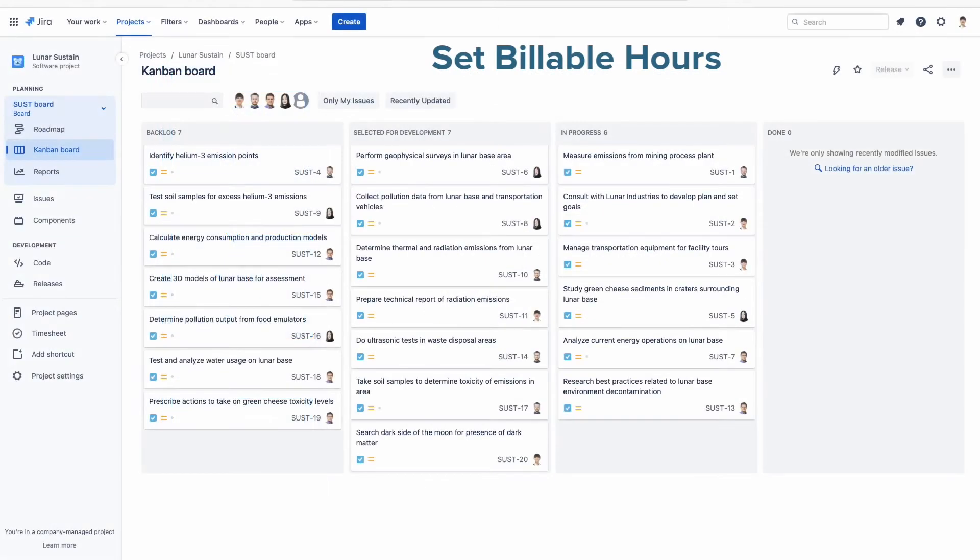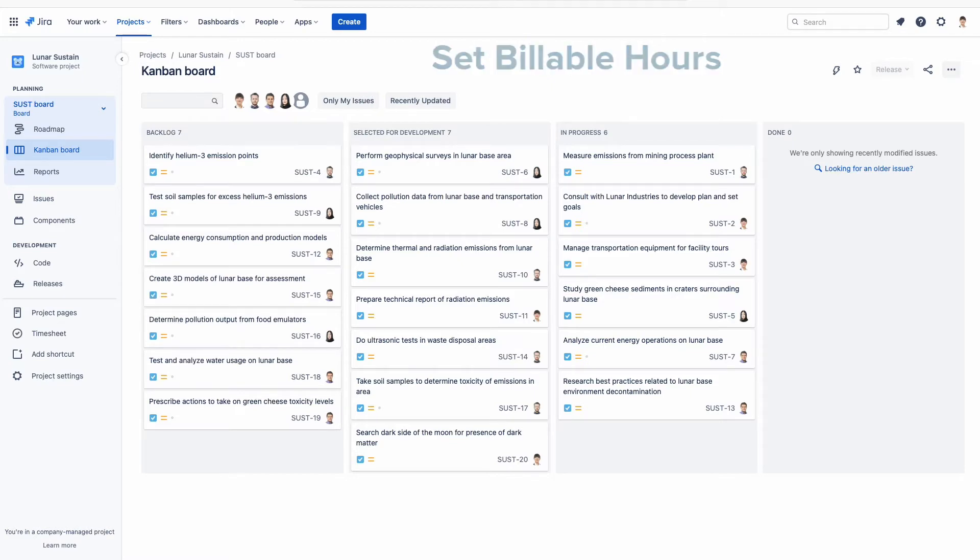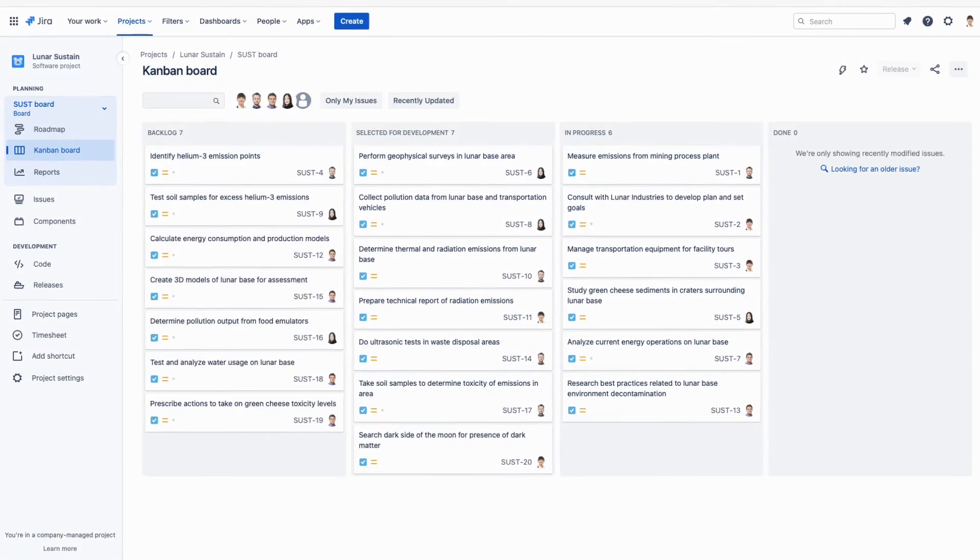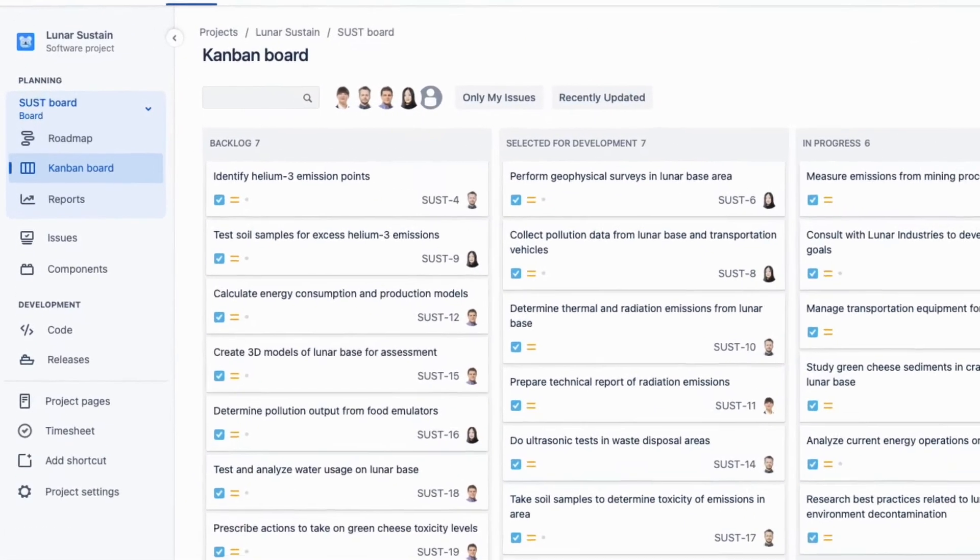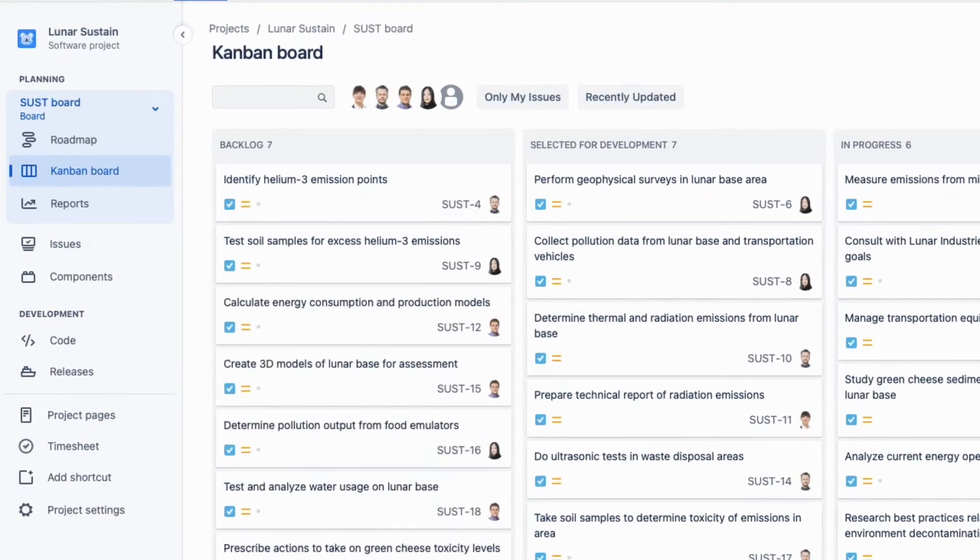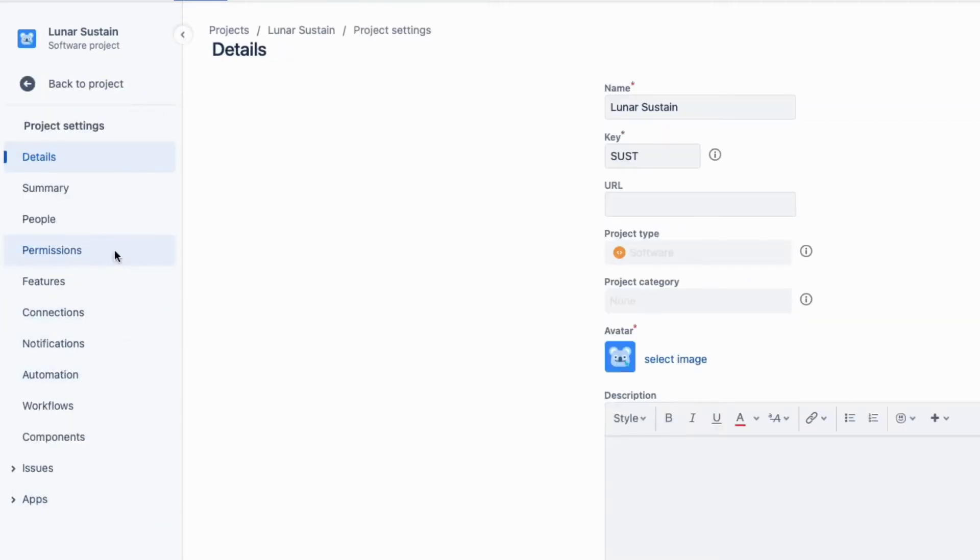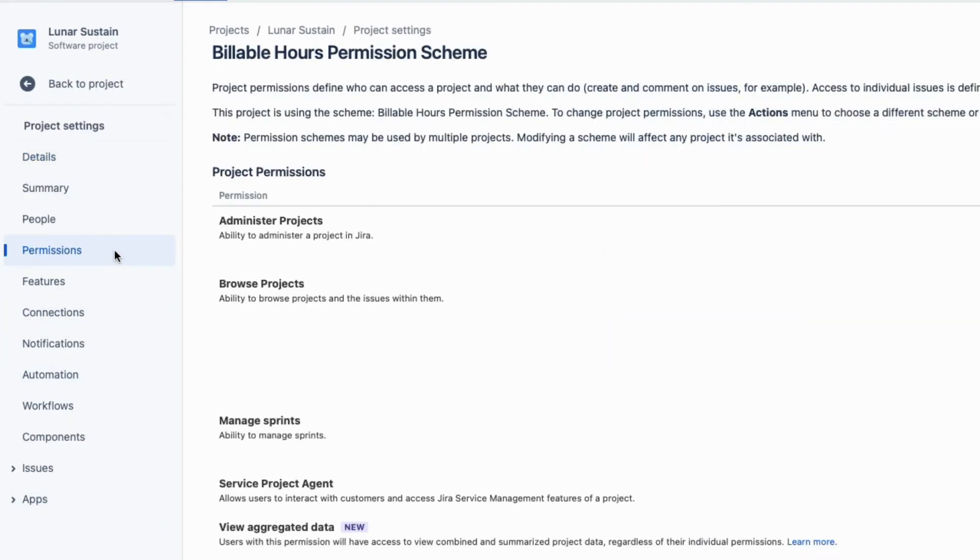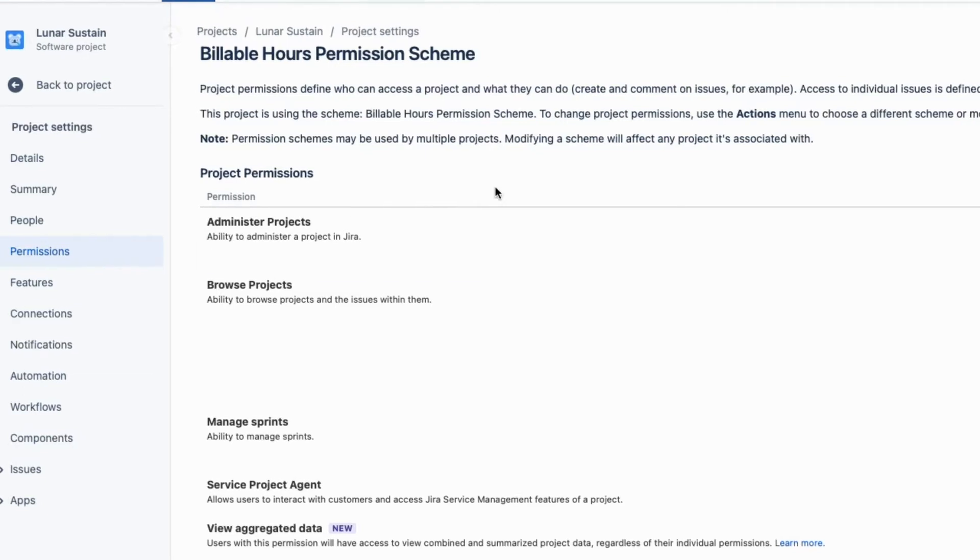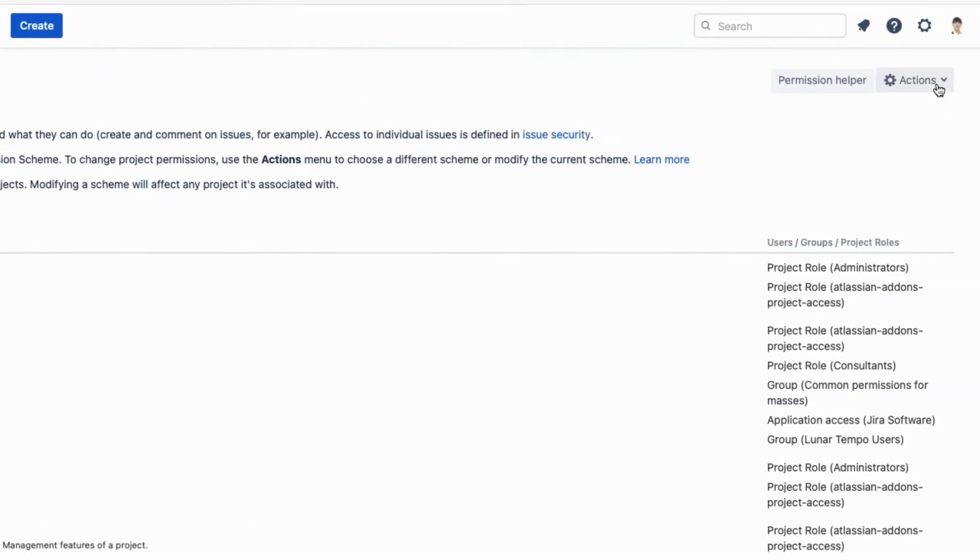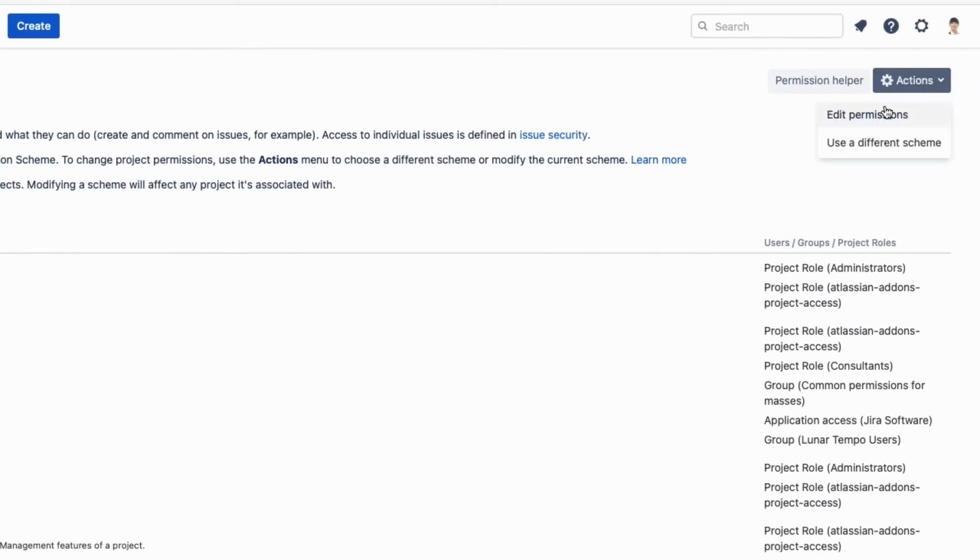So, first things first, my team of consultants and I need to have the Set Billable Hours permission for this project. I'm the project manager, but also have Jira Administrator permissions. So to grant this permission, I go to my Project Settings, and Permissions, and open this Billable Hours permission scheme, and then edit its permissions.